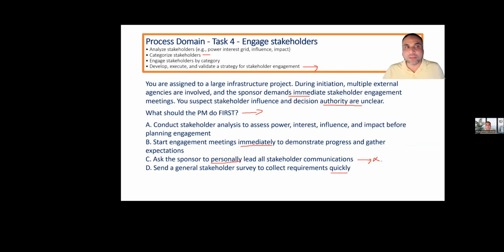Stakeholder engagement and communication is 100% the project manager's responsibility, and it shouldn't be delegated, because you will be leading them. So you want to stay in touch with them all the time. You can take the help of a team member to get the work done, but you will still be leading from the front, because your project is about stakeholder needs and expectations. So it cannot be that. We never do things immediately unless it's a compliance issue, but even for that we have to follow the process. So yes, the correct answer here is A. All of you are correct. Very good. B and D were good answers, but A was the better answer.